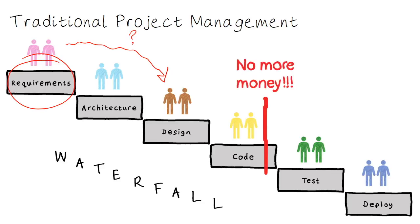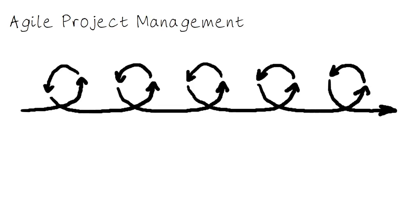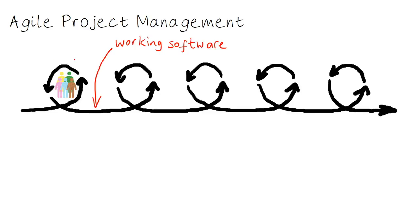The problem with this is that we've spent a lot of time and money creating something really rather extensive before we've had any user feedback. We've had to plan for and anticipate up front all of the features that a user might want. And with different teams of people being responsible for each phase, this can potentially lead to disconnect. And worst of all, if we run out of money, we haven't got a product that can actually be used at all. So with agile, instead of these great big sequential phases, we have these short cycles or iterations, typically just a couple of weeks or so. The idea is that we produce a working version of the product after each iteration, doing just enough planning, coding, testing, or whatever to complete the features we've decided to do. So we have the designers, the developers and the business people all working together simultaneously, rather than those strictly sequenced separate events we saw with waterfall.